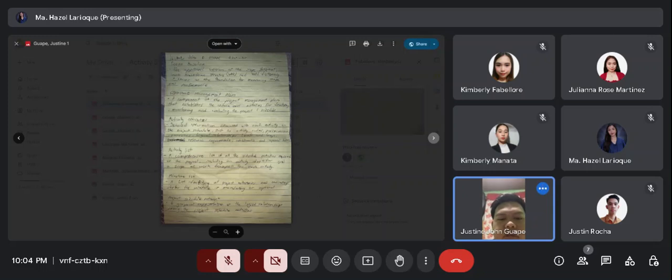Activity attributes. Detailed information associated with each activity on the project schedule, such as activity codes, predecessors, successors, logical relationships, and leads and lags, resource requirements, constraints, and imposed dates. Activity list. A comprehensive list of all the scheduled activities required on the project, including an activity identifier and the scope of work description for each activity.